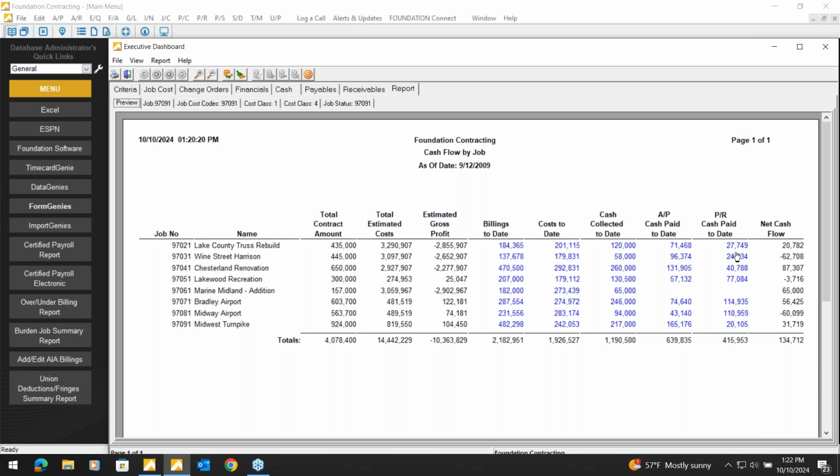Throughout the years, the standardized cost codes that a lot of people request are either the 16 division CSI list or the newer expanded one, both of which we have. We can use that as a starting point. We can provide that to you in Excel format, so it's a lot easier to clean up. If you want to remove certain cost codes that don't pertain to you, you can, or you can just give us the double thumbs up, and through the implementation, we would upload those cost codes for you.